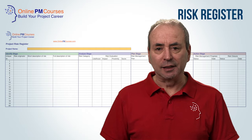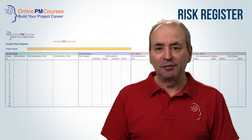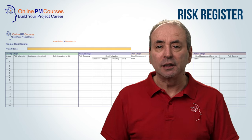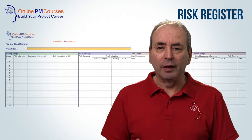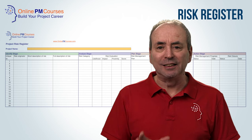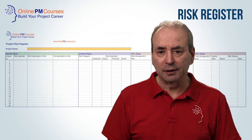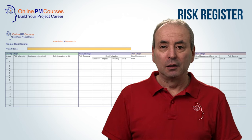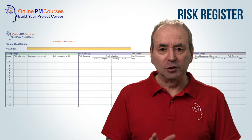The second use of a risk register is that it is a document of record. It is where we record diligently all of the risks we've identified and the actions we're taking to make the process transparent — it is part of our due diligence and the governance of the project. The risk register shows you are acting responsibly as a project manager. If you identify a risk, put it on the register and document your assessment. You won't be wrong if you make an informed judgment that turns out to be incorrect, but you will be wrong if you don't make an informed judgment or can't demonstrate that you did.